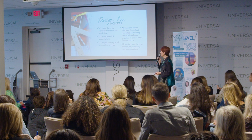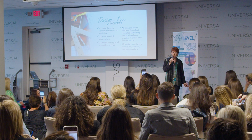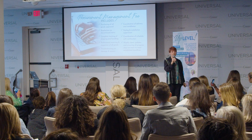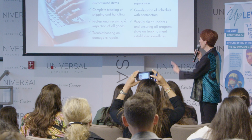So this is what your design fee includes: all plans, drawings, conceptual sketches and renderings, all mood boards and presentations, all project sourcing, but not the actual procurement. Finish and fixture selections throughout, and furniture, rug, lighting, and everything else. Now, here's really important. This is your procurement management fee. It is not a markup. It is not a markup. It is not a markup because it covers all of this.